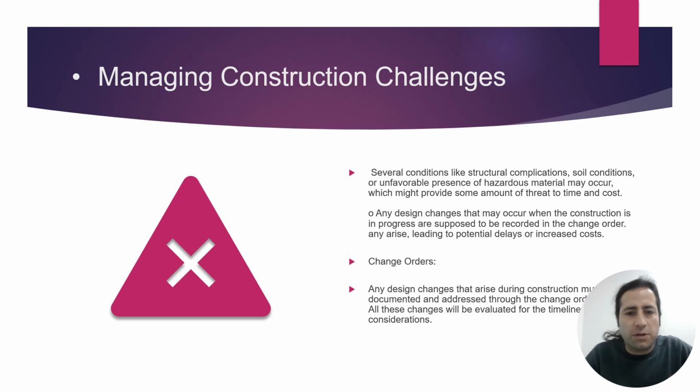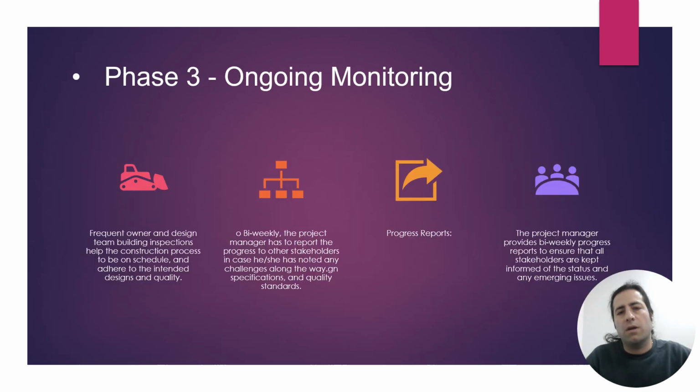Change orders: any design changes that arise during the construction must be documented and addressed through the change order process. All these changes will be evaluated for timeline and budget considerations.